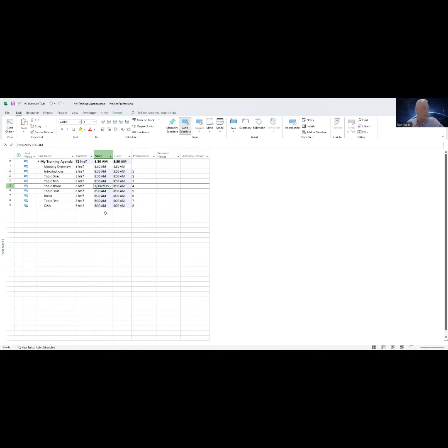Oh, but wait, now we've got another problem. You'll see the overall duration for this meeting estimated by Microsoft Project is currently 72 hours. Well, that's not right, because this meeting is on the calendars and it's really only a 2-hour meeting. So what we need to do now, again, would equate to PMI's schedule management knowledge area and the process of estimate activity durations. For each topic or agenda item, you would simply input the estimated planned duration it will take to cover the topic.